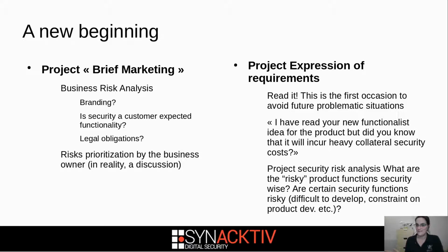of everybody else. And it's very important that you do that, because this is the first occasion to avoid future complications. For example, I had one time a device where every binary should be authenticated before being executed. Somewhere in a book of requirements, someone wrote that they should be able to download drivers on demand from the web, for example, which was very difficult to do if you had to actually authenticate all the binaries running in the device.